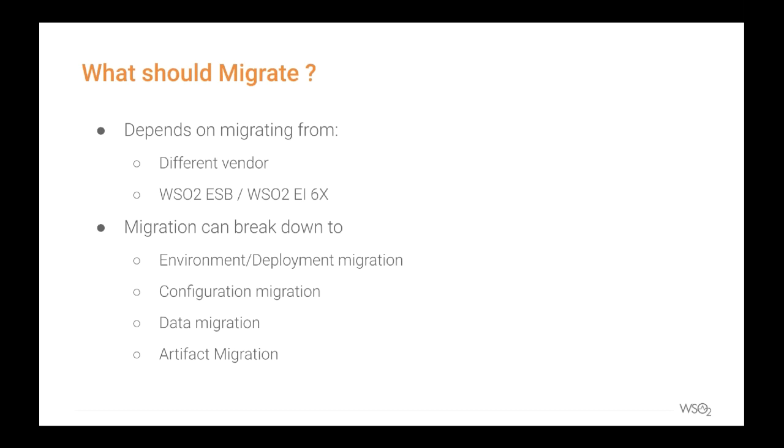Then again, you can break down the migration into four main areas. First thing is environment or deployment migration. You might have something related to the environments. Then something related to configuration, server level changes. Then something related to the data. You would have some data in your past deployment and you will want to run the services again with the same data. Then finally, the artifact migrations, the integration artifacts and things.